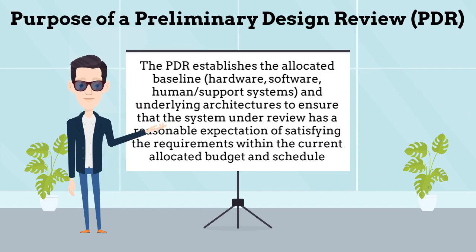What is the purpose of the Preliminary Design Review? The PDR establishes the allocated baseline, hardware, software, human and support systems, and underlying architectures to ensure that the system under review has a reasonable expectation of satisfying the requirements within the current allocated budget and schedule.